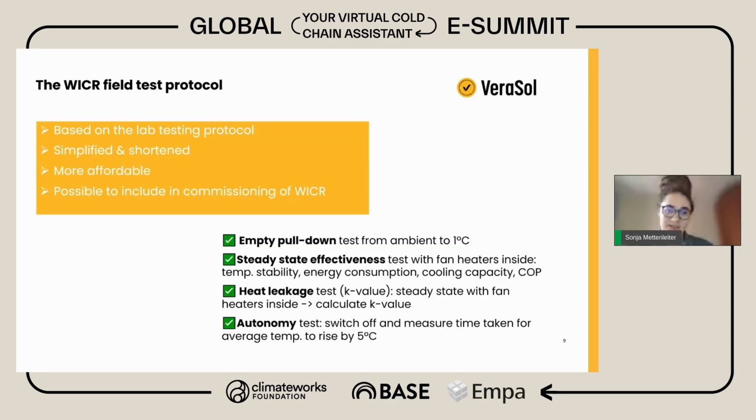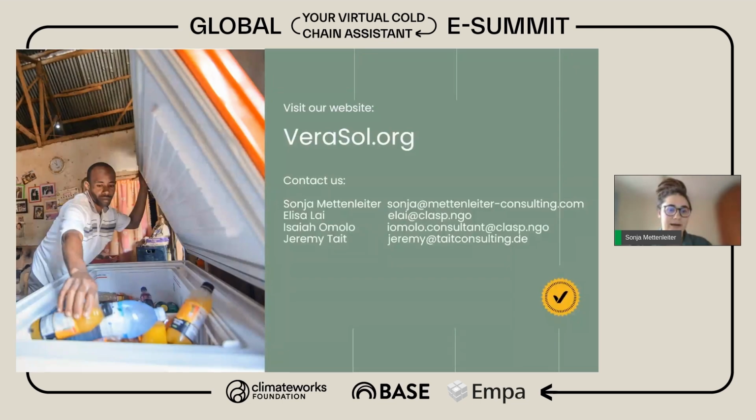You could also just have your components tested. But if you have been in the field, you see that actually the assembly of your tested component makes a lot of difference to the end performance of it. That's why we think that the field test protocol would be a very viable thing to include in commissioning.